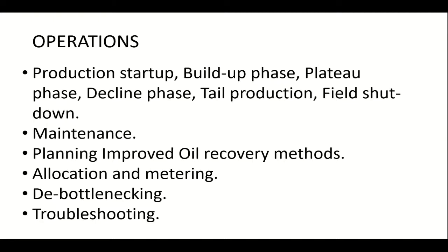talk about them a bit later. There are some differences if it's an onshore or offshore field, but we have essentially startup, build-up phase, then we have a plateau phase, and then we have the decline phase. All of these names have to do with the rate. Okay, startup, build up, I start to build up the rate of the field, you see it's going up. Plateau, usually we have a period where the rate from the field is constant, and then we have the decline, it starts to go down. Tail production, just the end of that decline and the shutdown of the field.